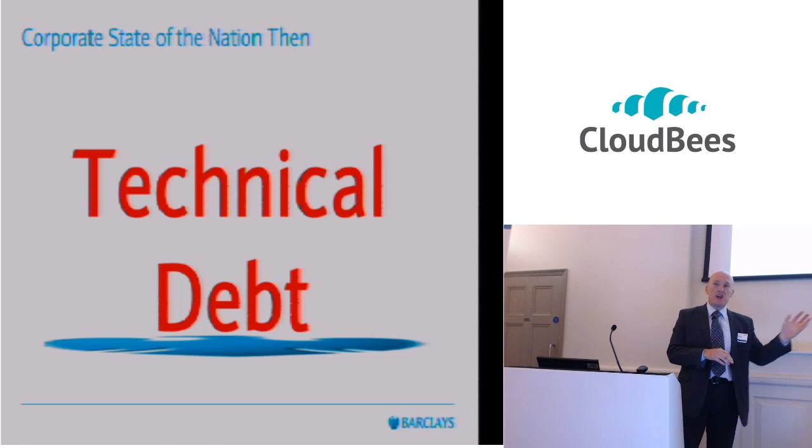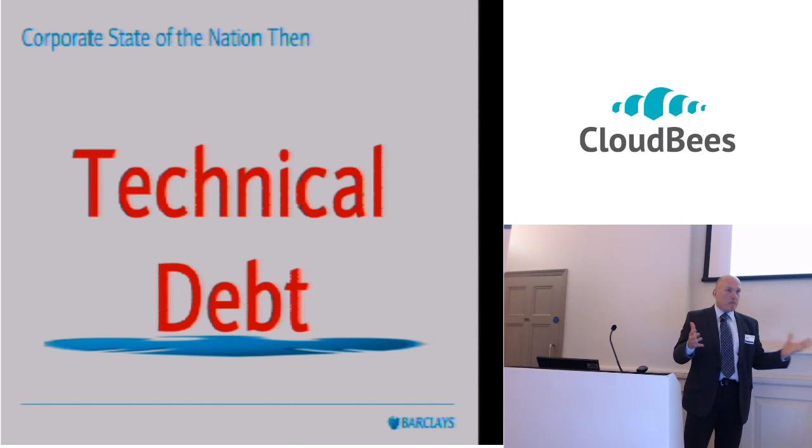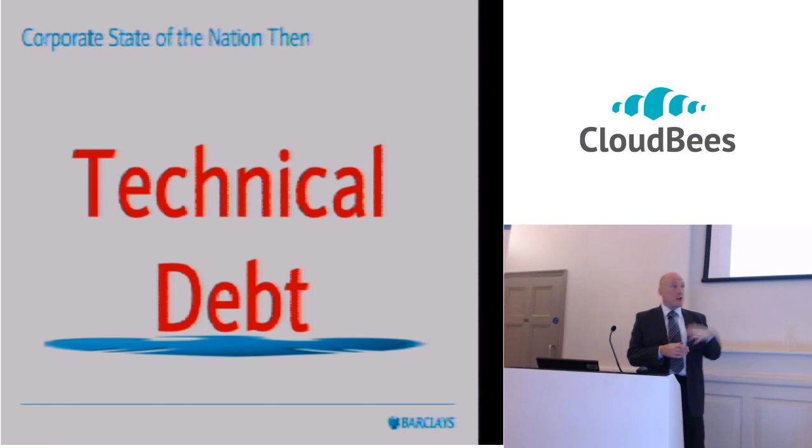So it went to SI partners, and they really weren't interested in delivering the kind of quality that we needed. If anybody's tried to deal with an SI partner to get a service delivered or a piece of software, you basically define your requirements up front, they go away, they build it, and they bring something back which doesn't necessarily meet what you wanted in the first place. And if you want to make a change, then they start asking you for more money and more money and more money. And so at this particular point, the corporate bank was in a fairly poor state, to put it mildly. So they decided to make some changes.